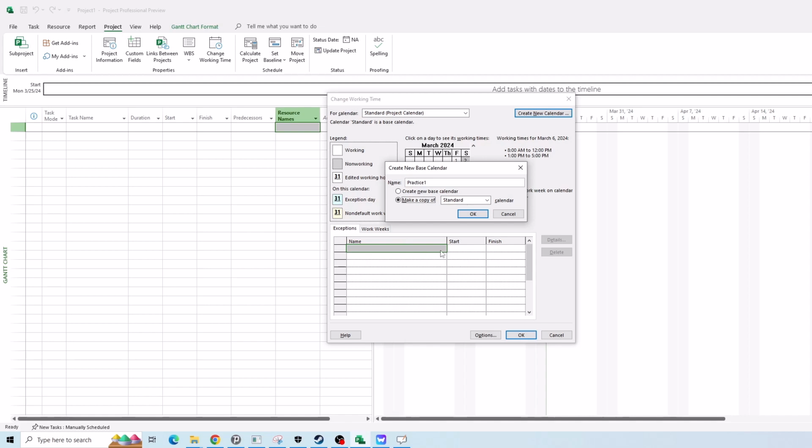Now you want to create a new calendar that is similar to this calendar, only for example some working hours are different, or some small changes, a small difference between these two calendars. So in that case, you can make a copy of that specific calendar and then modify and change it accordingly for the new one. Okay, so it's a very handy and useful option.